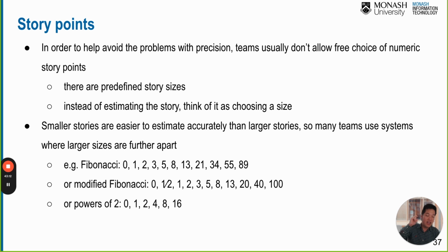And if you think about the INVEST principles, this one may be considered too large to be a user story, right? So that's why you should break it down. With the 21 story points, can you really break it down into smaller ones? What is inside the 21 story points? That kind of thing. Does it make sense to everyone?